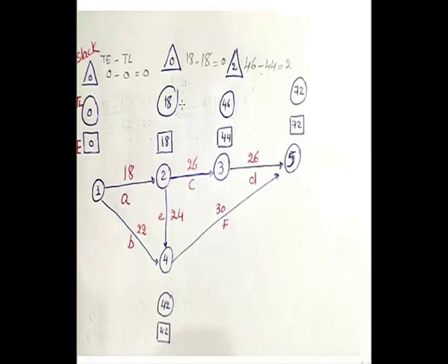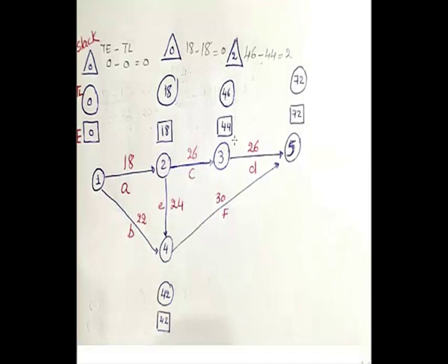For event number 3, if you subtract 44 from 46, then the slack here equals 2, which means that there is like a space of time between these events. It stands for the amount of time between those events, like how much time you can wait or not start work and so on.